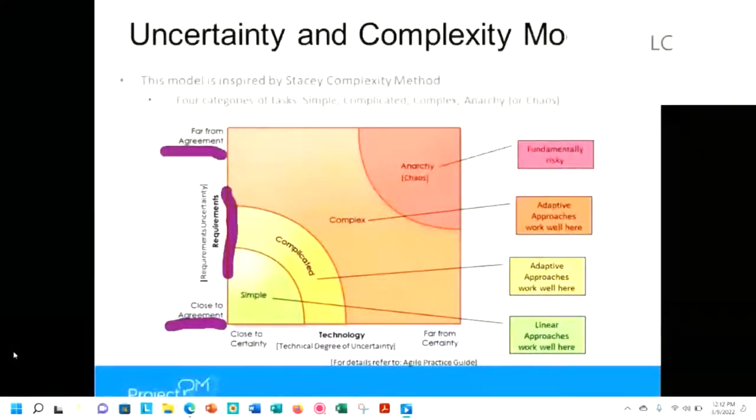We have the other side of the graph looking at technology. And I would say, again, not the word technology, but it's really the work necessary to achieve the requirements. Is it certain work? So simple or certain work, meaning we've done this before, we understand this, we can do this? Or is it far from certainty, meaning we're not quite sure what it's going to take in order to deliver these requirements? There's a lot of unknown in terms of the steps or the process and the knowledge that it takes. And so we have this continuum from simple projects to complicated projects to complex to chaos